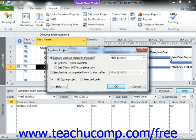In the Update Project dialog box that appears, you can select the Update Work as Complete Through option button first. Next, select the desired date to mark the work completed through by selecting the desired date from the adjacent calendar drop-down arrow.